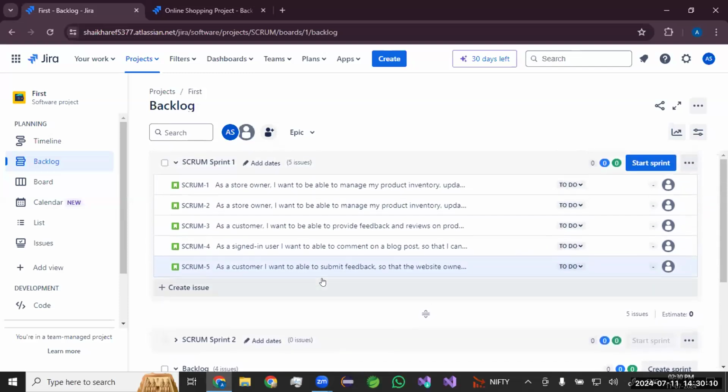So it is the product owner and the Scrum Master. They will come together. They will see what user stories have been given by the customers up to now, and they will talk to the customer. They will say, sir, out of that, which are the things you would like to make a high priority? We will try to make it working software and we'll just work on that area. That is what he has added inside this area. Whether he kept all user stories inside, tell me.